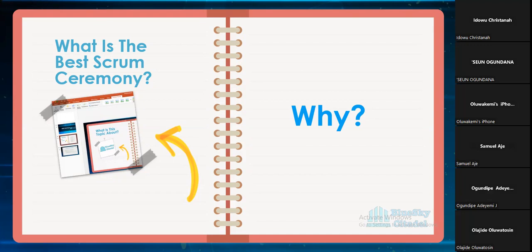Now, if you're exceeding 4 hours, then you know something is wrong. You just have to time box. They're giving you a time box of 4 hours within the sprint, because we need the other hours in that sprint to do development work. You can't use all the hours for ceremonies. That's why we are time boxing it. That's why they are giving you standards of 4 hours, 2 hours, 1.5 hours, and then 15 minutes every day. So that's virtually saying in a full sprint, you're going to be using 8 hours plus on ceremonies.